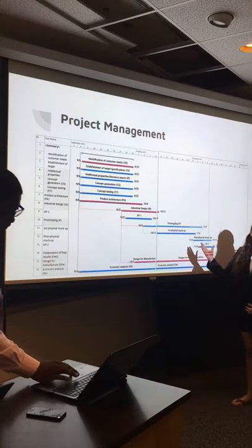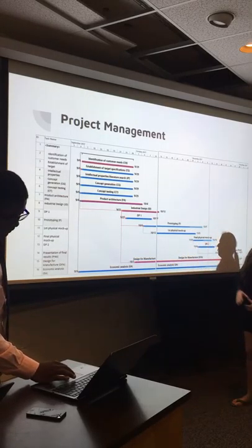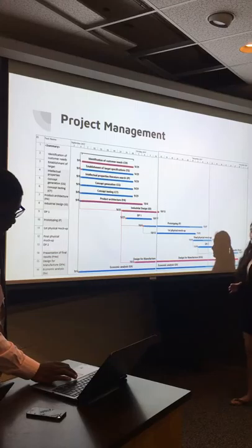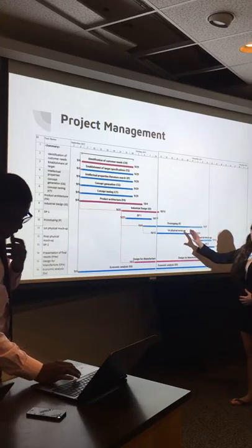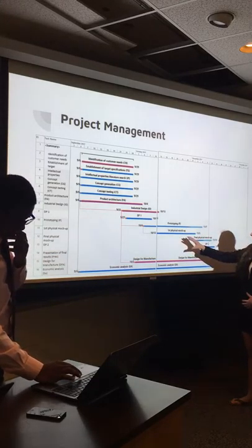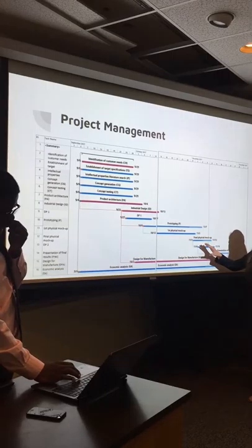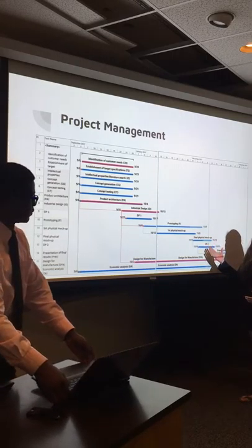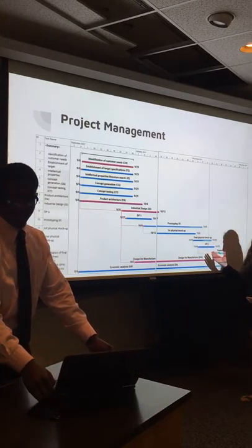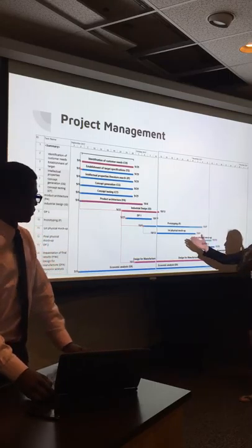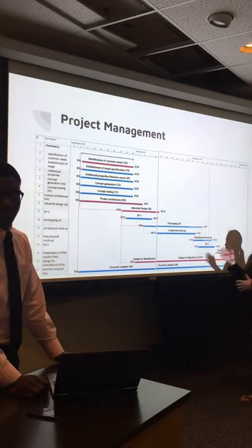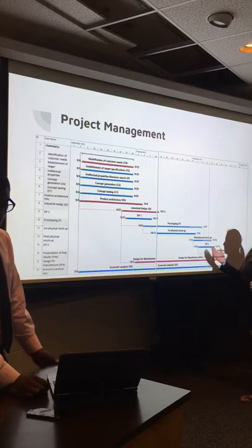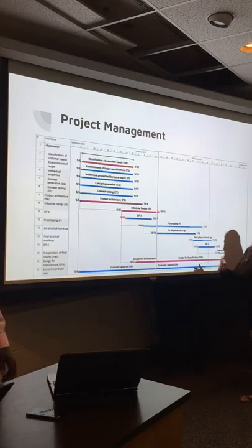In the project management category, we updated our Gantt chart. What we've done since DP1 is all of our prototyping, our first physical mockup, and most of our final physical mockup. Our team is a little bit behind in the final physical mockup stage, but we're working with our first physical mockup, tweaking the designs so that we can finish up the final physical mockup on time.